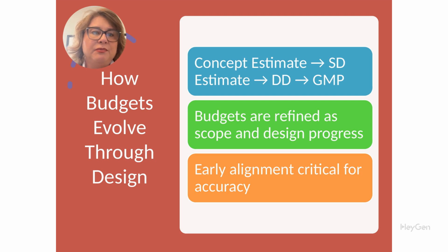The project development process often begins with a request for proposal, RFP, especially in design-build or construction management delivery methods. RFPs provide potential teams with information to submit proposals for selection. They define the project, its context, design team, schedule, required services, form of agreement, and submission requirements. RFPs guide the design-build teams in developing their proposals and understanding owner expectations.